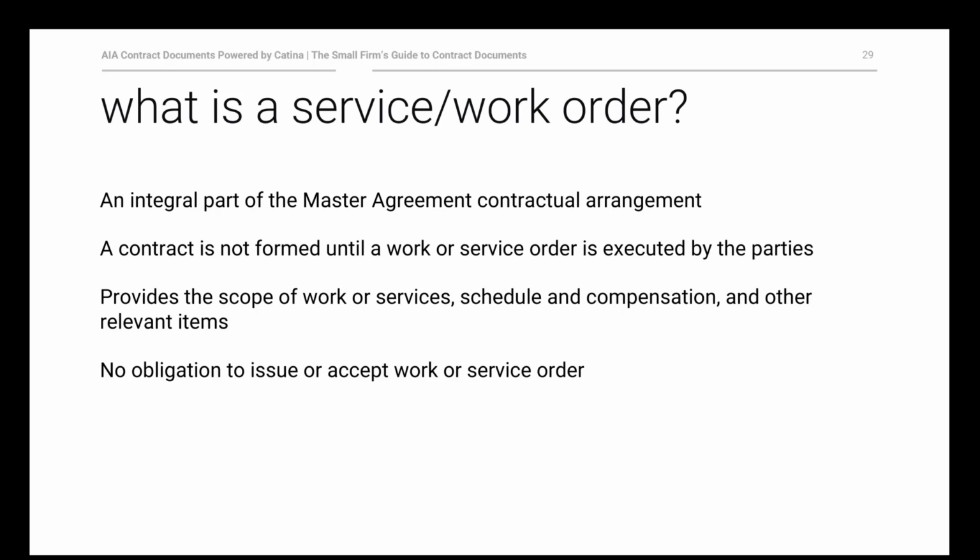Also, it's important to note that at least under our master agreements scenario, the owner's not obligated to issue work or service orders, and the parties are not obligated to accept all work orders or service orders that the other party might propose to them.